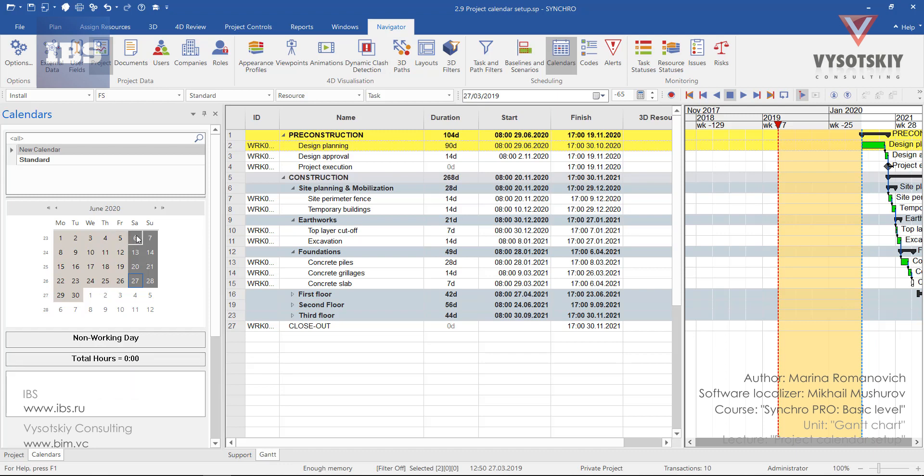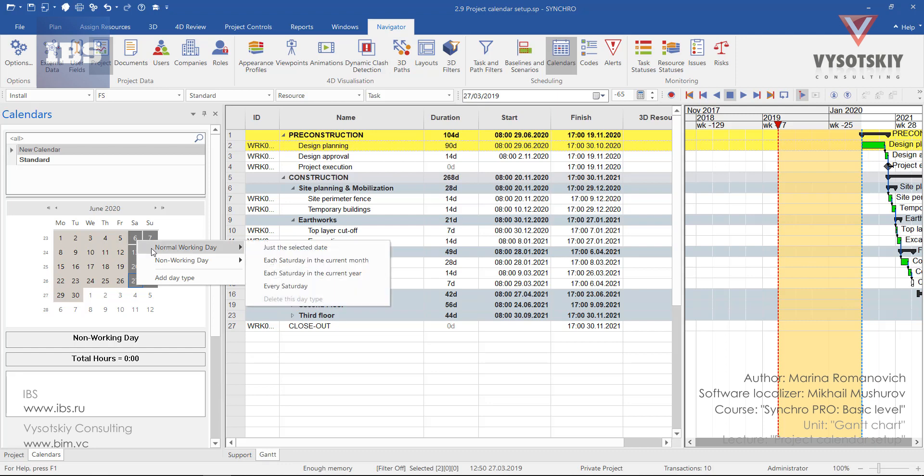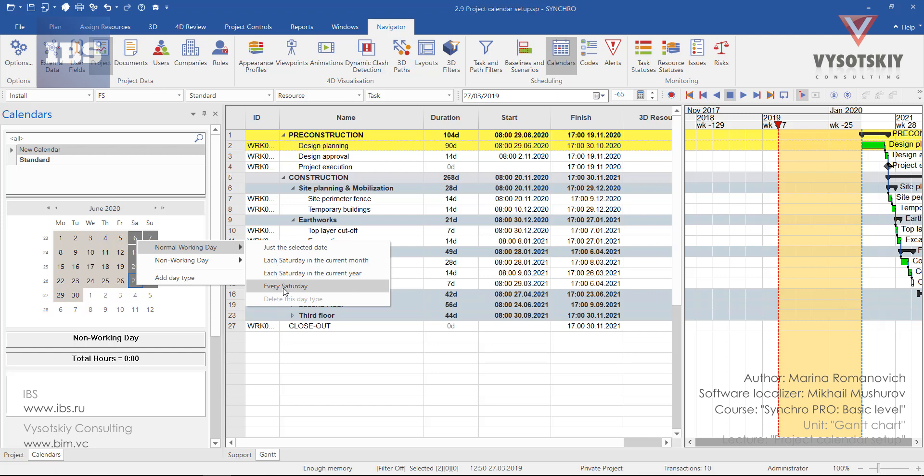Let's make Saturday and Sunday as working days. Make a right-click over the Saturday cell, go to normal working day, and from here select either applying this on the selected date, or each Saturday in the current month, each Saturday in the current year, or every Saturday. Select every Saturday.